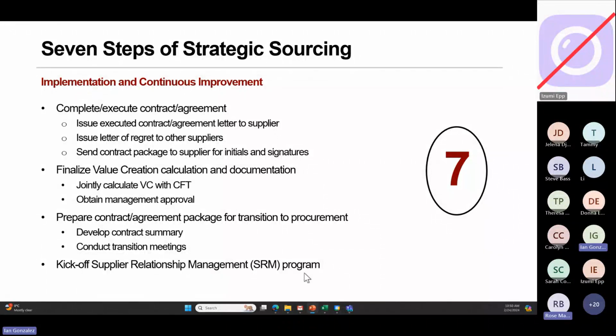So for the length of the agreement, all right, and this is more needed if the agreement is longer, like 3 to 5 years, compared to 1 year, you say that you have a CFT, and then you communicate to the business: we will be monitoring them on these KPIs, and we have an incentive, and so on. These are criteria for extending the contract or for offboarding them.